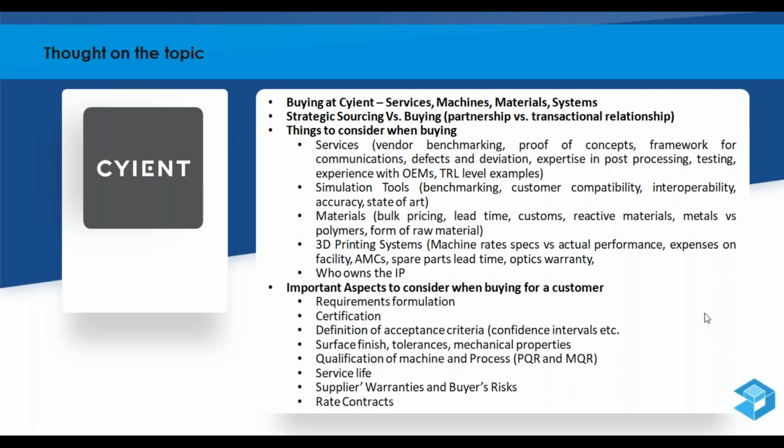For example, if you have a high mix, low volume set of components that you're sourcing from one of your partners, who bears the cost of the failure of the component, right? And so these are things that need to be discussed and framed into several rate contracts as well as partnership agreements when you're looking at buying for additive manufacturing.